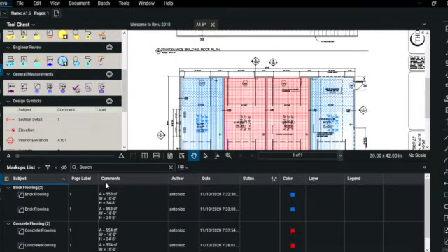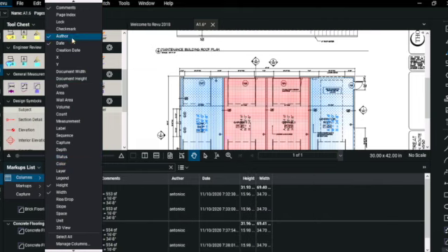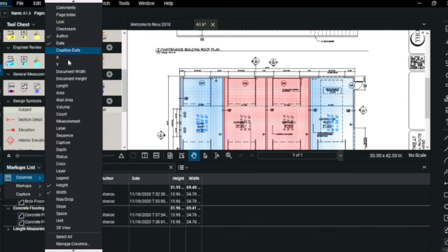Next, in order to get a formal distribution of our estimate, go to the markups list and select the columns needed. There are several columns you could choose from, however for this I only chose the area, the height, and the width. I chose to get rid of the comments because that shows the same thing, but we are unable to use those values as numbers.